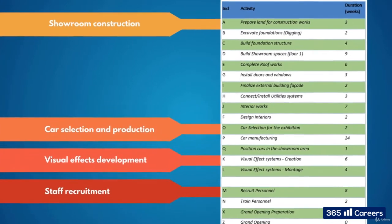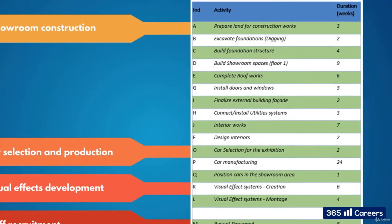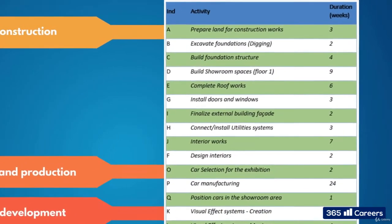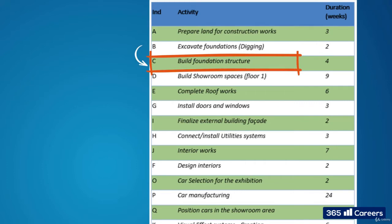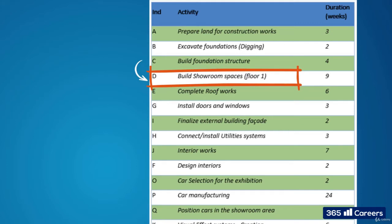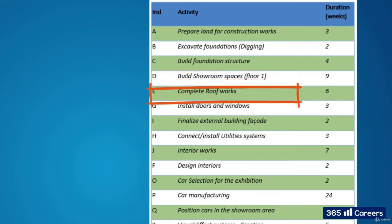Let's see how each stream flows and how or if they intertwine. Excavate foundations follows prepare land for construction works. Build foundation structure follows excavate foundations. Build showroom spaces follows build foundation structure, and so on. The majority of these are logical dependencies, but remember there can always be resource, external, and soft dependencies to consider.